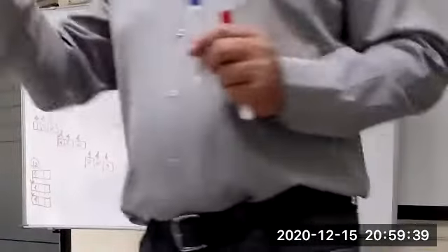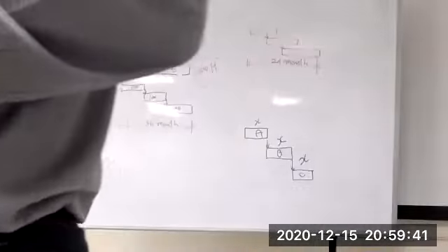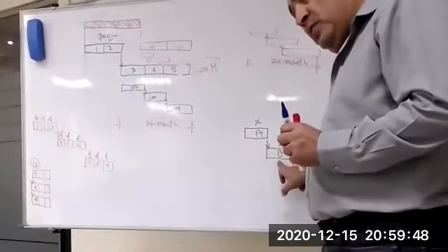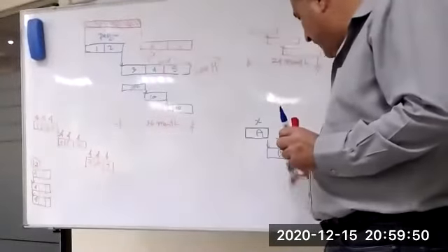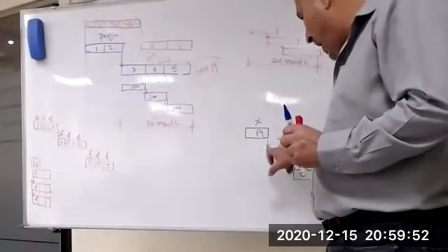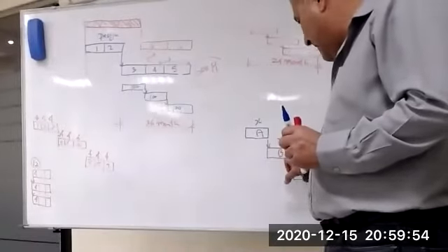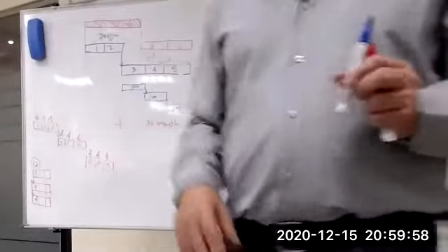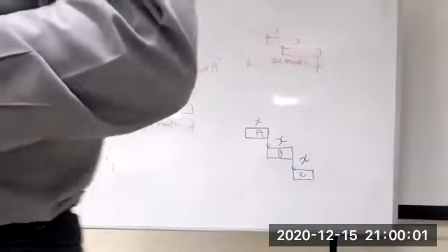But assume you don't have this X, only one X. You have to distribute: finish A first, then B finish, then C finish. So then X, after you finish A, goes for B. After you finish B, goes for C. That's it. That's the efficiency. We are always using leveling in the tendering stage.